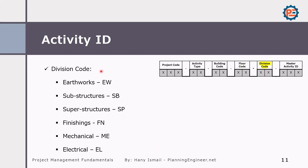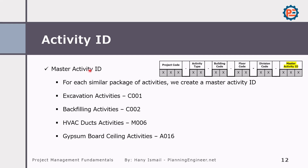The division code gives a good understanding of the activity — whether it is earthwork, substructure, superstructure, finishing, mechanical, electrical, and so on. You can also filter any activity using any of these digits. Finally, the master activity ID: in my projects, the excavation activity will always be C001. It might appear in different buildings, floors, or divisions, so whenever I see C001, it means excavation works. This makes filtering for a certain activity very easy.